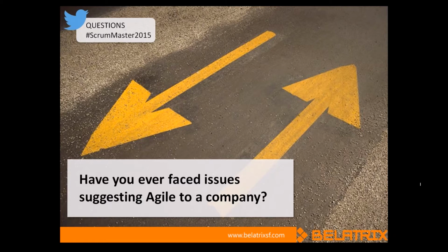So what we did, and it really worked, was to tell the client the benefits of using Scrum, making sure they understand all the terms, all the artifacts, everything that is included there, the typical meetings, the people that will be involved, and also to let them understand that their availability and engagement are also crucial for this methodology. So, for instance, we started with quick meetings, like 5 to 10 minutes, just to let them know all the concepts that have to do with Agile, with pictures, very quick ones.